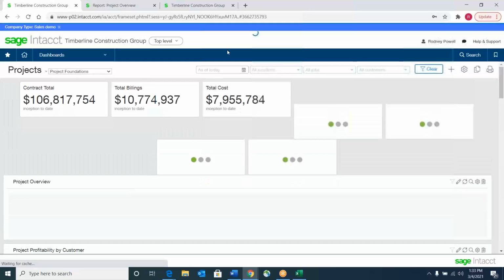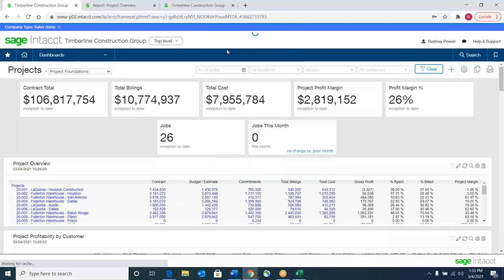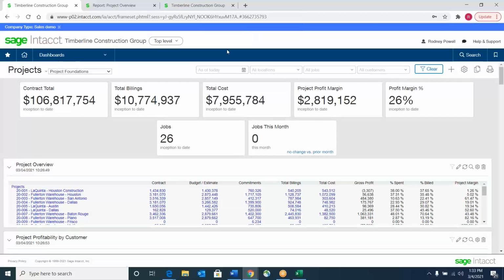So, Patrick, is that you or me? No, go ahead, please, if you want to address it. So the estimating is certainly a functionality out of the box. As I said, you can use a template, you can create the estimates, you can upload, you can certainly have more than one estimate. So your original estimate that goes along with the contract, if you make some modifications, you can keep track of all those, and you can do all of your billings and things from the actual estimates.